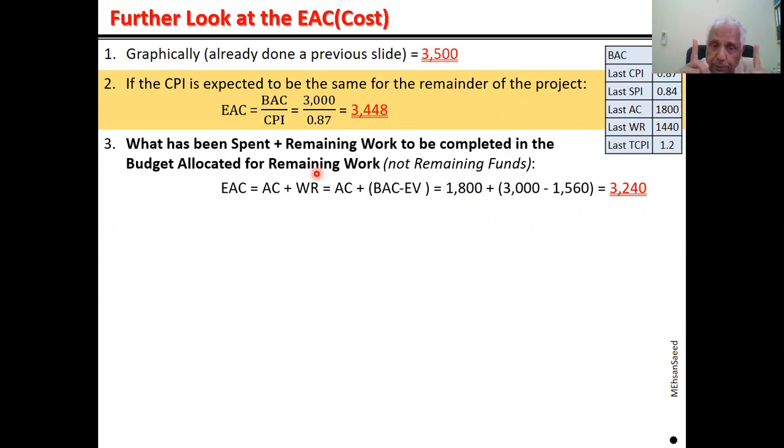Well, again, conceptual understanding. If you want to apply the formula, here is the formula. EAC is equal to AC plus BAC minus EV, and apply these figures and get the answer. But logic, conceptual approach is a good approach.